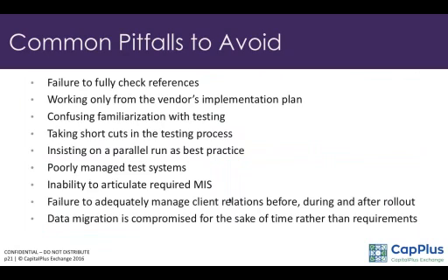Please don't take any shortcuts to testing, because if you take shortcuts, you're bound to fail when you go live. Parallel runs are in the past. You don't run parallel. You test the system, you train your staff very well. When all of you are confident that you can run live on a certain date, you run live. You usually don't run parallel.